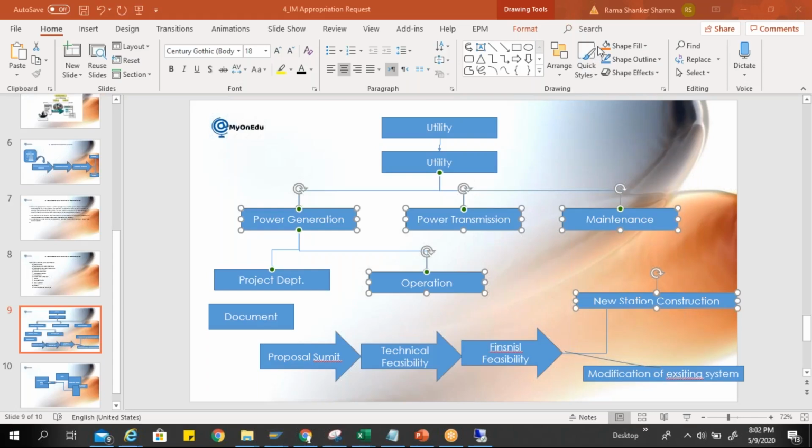Yeah, basically when we are creating the appropriation request, we are putting some planned budget value in that appropriation request. Based on that overall budget, you can make it pick the approvers automatically. You can do that, but it's an enhancement. It's possible. I have done it already, almost 8 years back. I have used that.